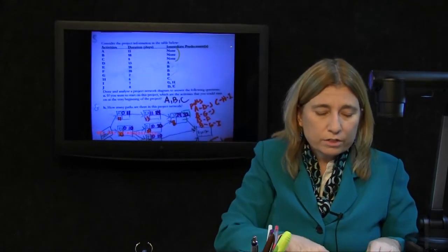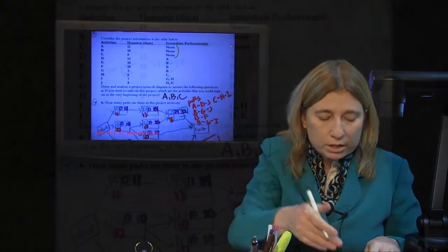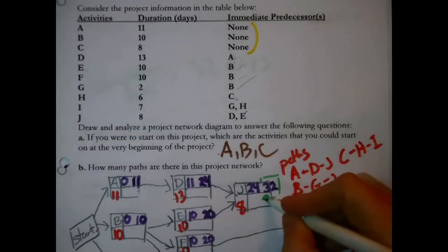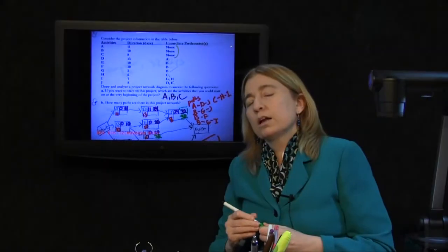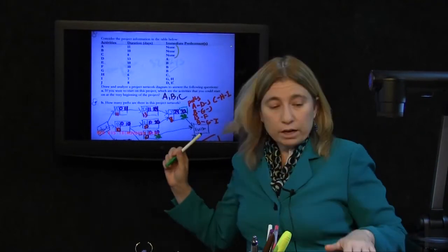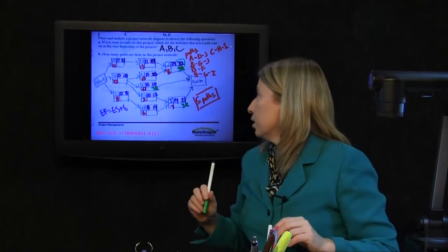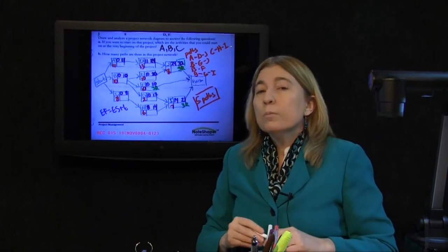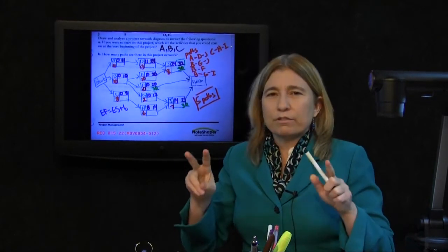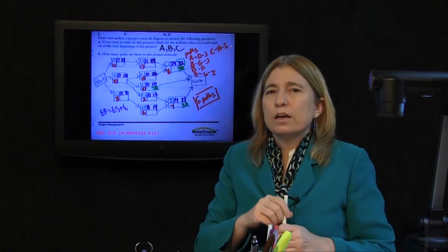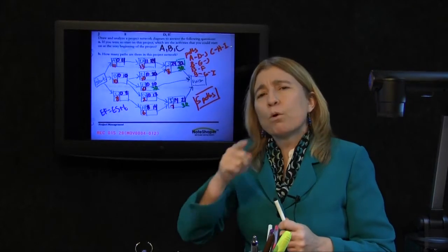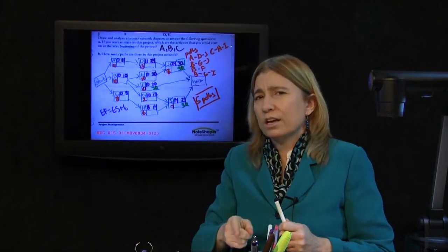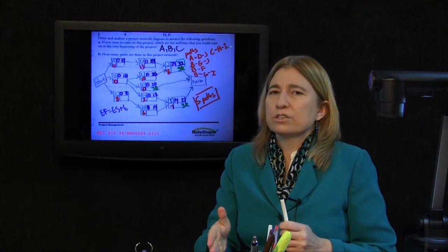This will get us started on the late start, late finish times, because that automatically becomes the late finish time of each activity, each one, 32, 32, and 32. That automatically becomes the late finish time of each of the activities that is associated with the finish node. Because we basically, in discovering it, have made it the deadline. We're saying that we could finish in 32 days, therefore we're going to finish in 32 days. Therefore, each task that's attached to the end has to finish at the latest in 32 days.